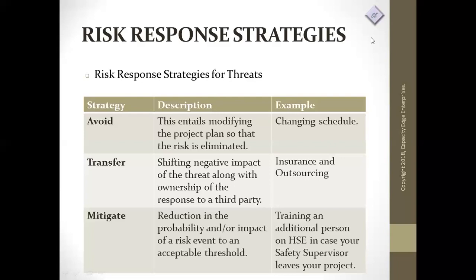Another example of avoid could be that in order to discourage or prevent your supplier from delivering late, you could include a stiff penalty in the contract. So for example, if you deliver late by even one day, even though you completed the whole scope of the job, you'll be getting half of your money. I think that is stiff enough. So that is avoid. We want to prevent the threat from occurring.